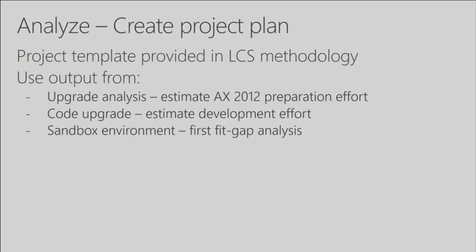Once all of this is done, you create a project plan. We highly recommend that out of all of this analysis phase, you actually have a clear project plan. We have a sample project plan in the LCS methodology. It's a Microsoft Project file that you can open from the methodology that guides you through all these phases, so you can basically add your data to it, your nodes, and additional tasks you have.